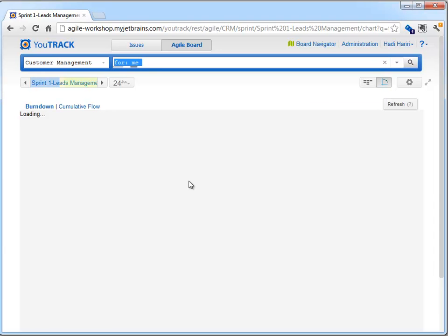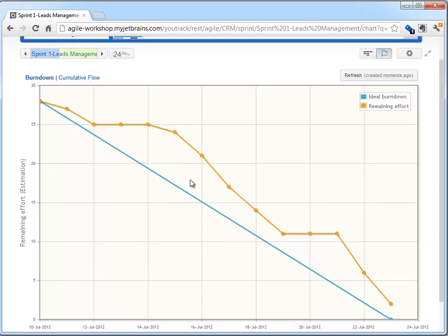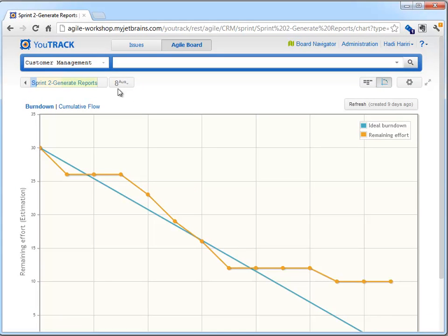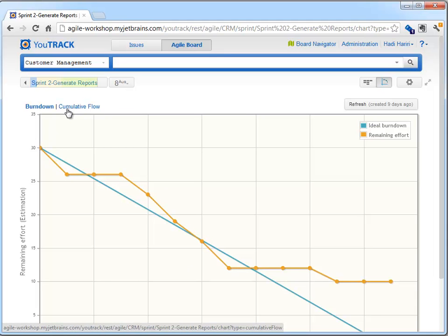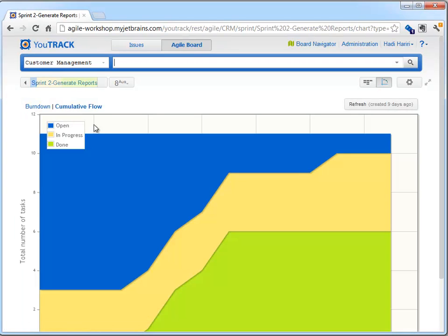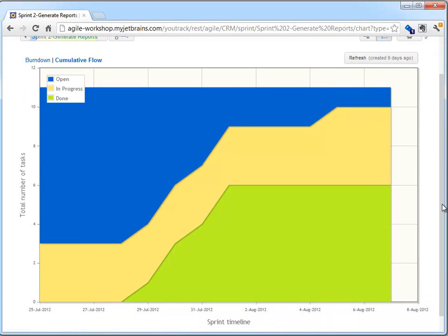In addition to the board, Scrum support in YouTrack also provides a burndown chart, where we can see the ideal burndown versus the current and remaining effort for each of the different sprints. We can also see the cumulative flow chart, which represents the amount of issues per stage during the sprint timeline.